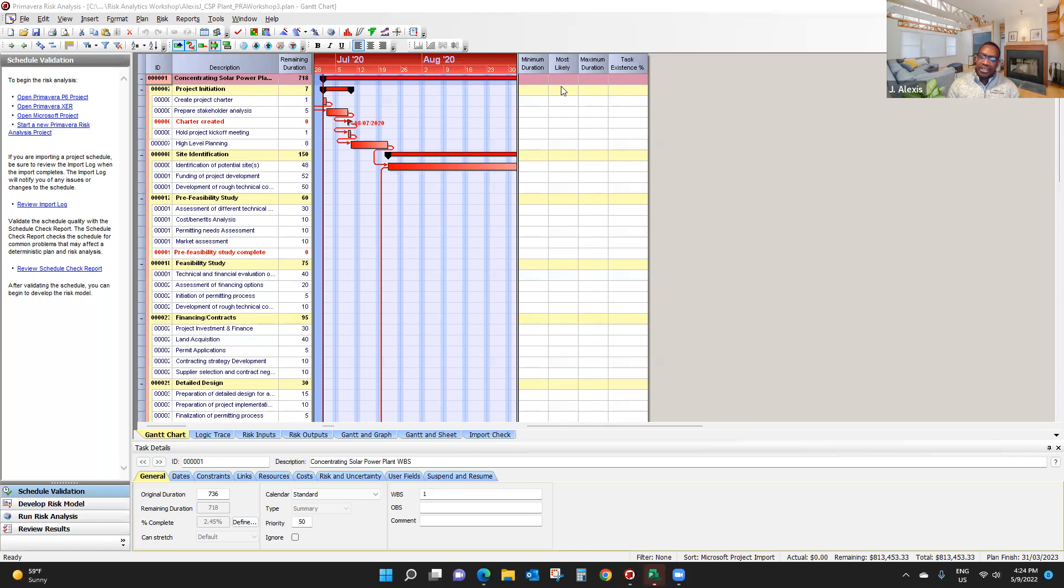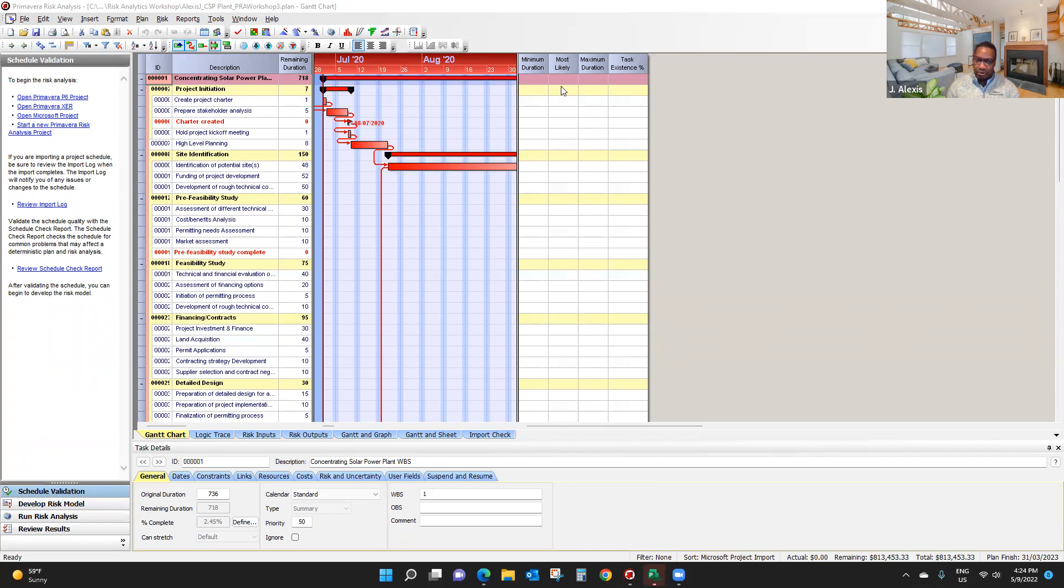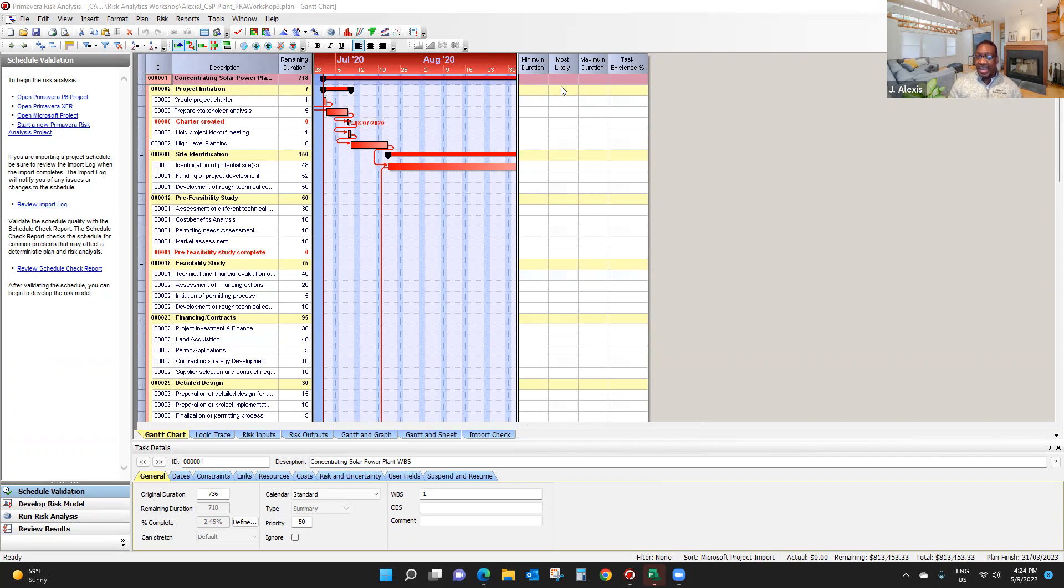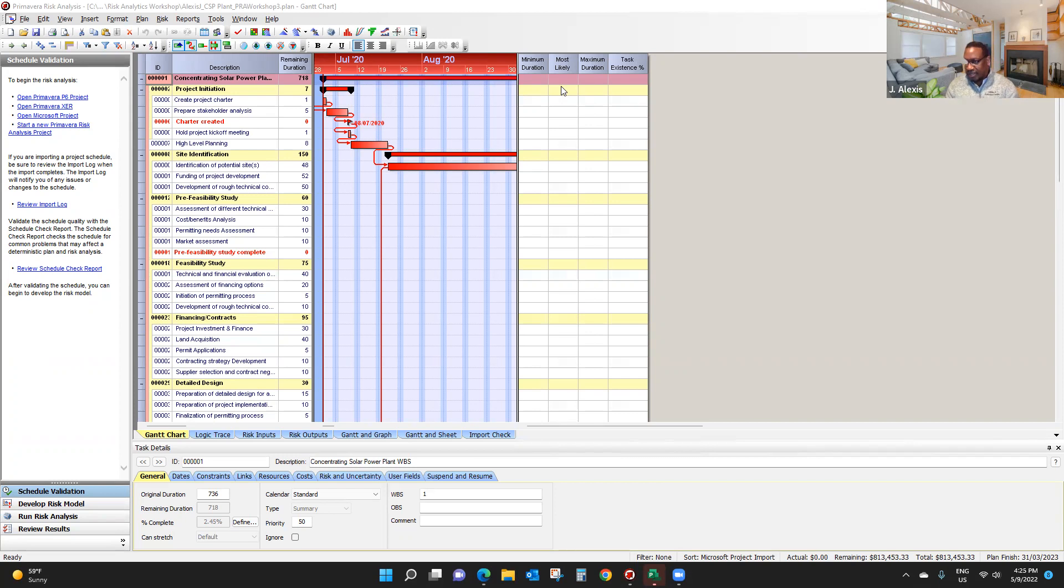Usually, this information is from people with key information about the project. People with expertise, people who have done similar work, or you may probably call vendors to see what the range of estimates might be. But here, to work faster, I'm going to show you how to use something called a duration quick rest.